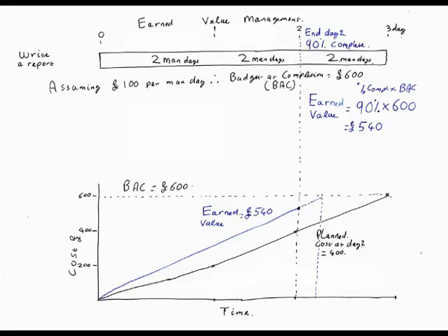And what we'd really like to do is convert that percentage complete into a common currency, which is cost. Planned cost. So we invent a new term called earned value. I have earned 90% of the work package budget. So I've earned 90% of the budget, which is £600. So I have earned £540 worth of earned value.